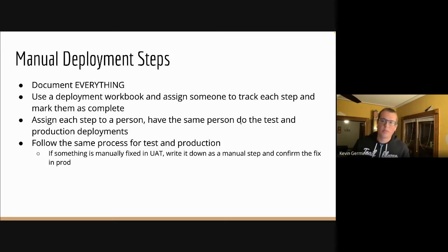When you have a larger deployment, use a deployment workbook to track the steps, and have someone in the room or on the call whose job it is to go through the workbook and make sure every step is completed, marked as done, and that the right person is doing it. Everyone in the room should understand that they do what the workbook says.